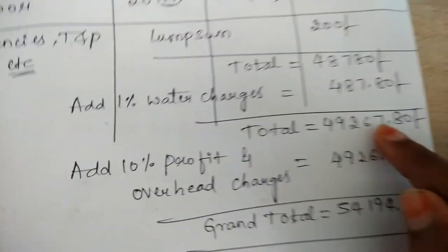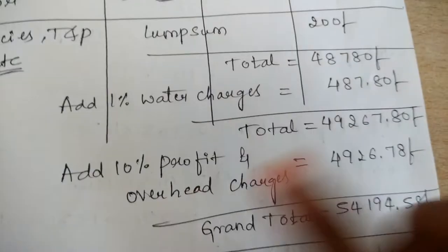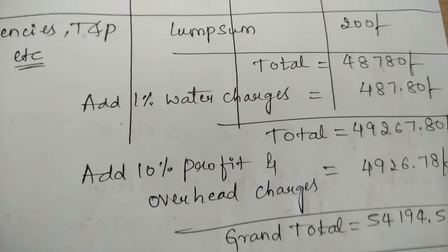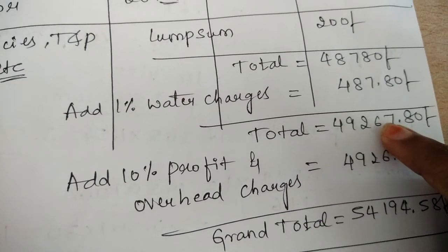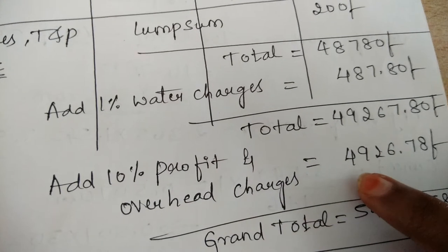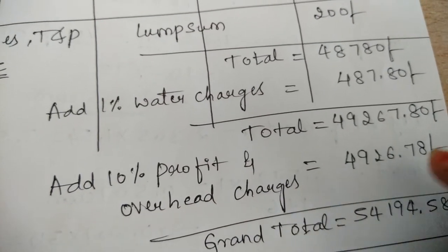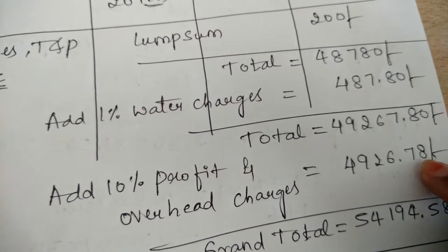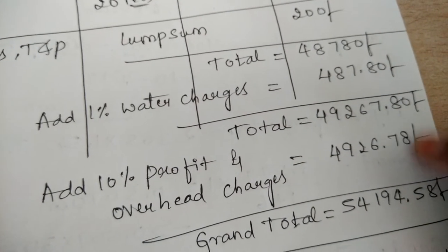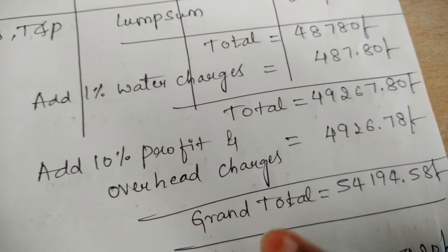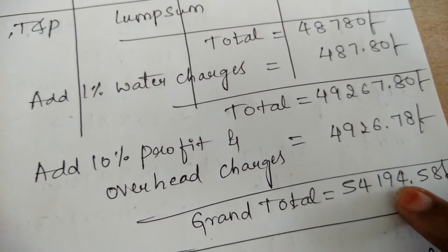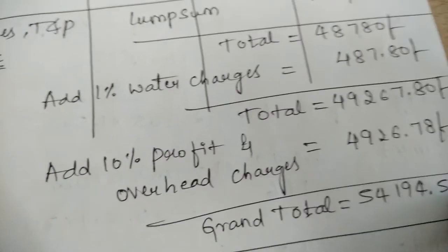For this new amount, we add 10 percent profit charges and overhead charges. Ten percent of this amount gives 4,926 rupees 78 paise. Finally, on adding these two amounts, you get a grand total of 54,194 rupees 58 paise.